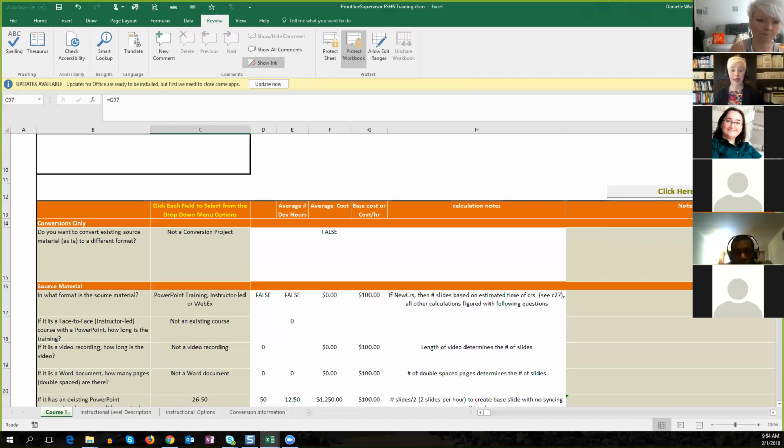Go Animate is kind of newer for us. We've been using it for a long time, but I haven't really had a ton of it in projects. We've got a project where we have like 5 Go Animates in the course. Again, we're tracking our time on those. For those 5, it took us 30 hours the first time, to make edits, to drop in new audio, to make new changes, at every stage. So that'll probably be a line item.